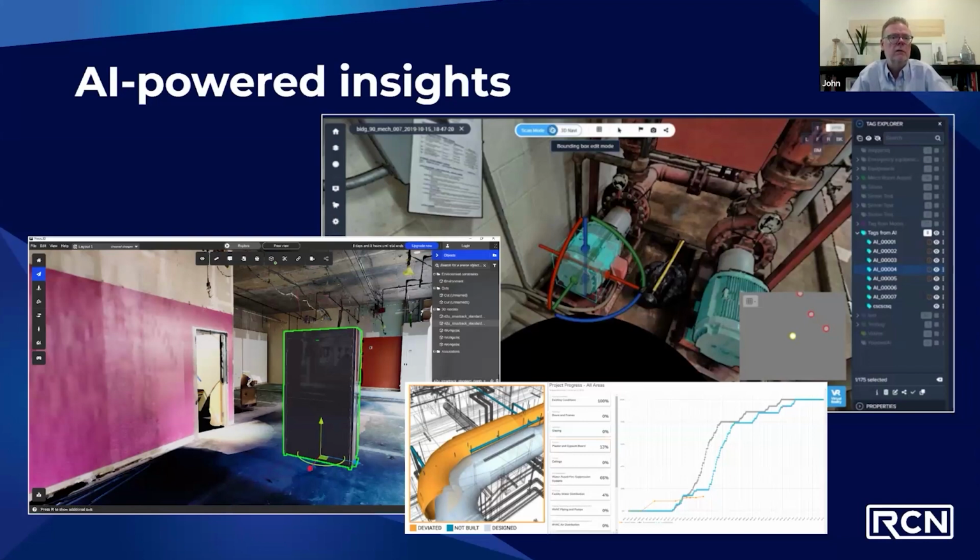Why are we deviating? And when we talk about building in mission critical spaces, there's a lot of thought that goes into why piping and conduit and cable trays are put in a certain hallway a certain way, and that's to allow for future expansion. In some cases, we'll see a trade go out there and they're the first one in, so they put their stuff wherever they want to. This allows you to course correct very early on, and mitigate that issue right from the get-go.